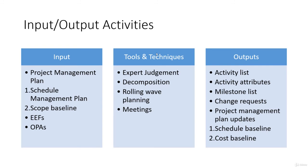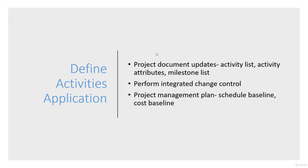Outputs include the activity list, activity attributes, milestone list, change requests, and project management plan updates including schedule baseline and cost baseline. The application updates project documents — activity list, activity attributes, milestone list, and the change control process, as well as the project management plan like schedule baseline and cost baseline. While developing our schedule and timeline, we also look at cost estimates and the efforts needed to implement changes, which helps with cost baselining. That's it for now — we have a few more activities within this knowledge area and we'll address them in the next few videos.